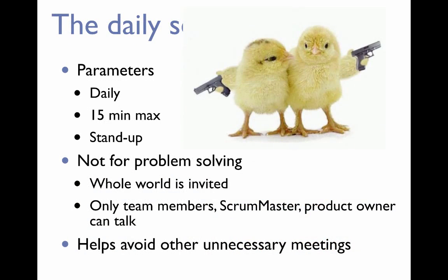The second ceremony is the daily scrum. That is how you meet every day, and I can't stress this enough, in your team while you're on this project, in this class. You should somehow meet face-to-face or virtually face-to-face, I don't care how, but somehow face-to-face every day for this meeting. 15-minute maximum. If you can do it in meet space, meet in person, you should stand so that the meeting doesn't drag.